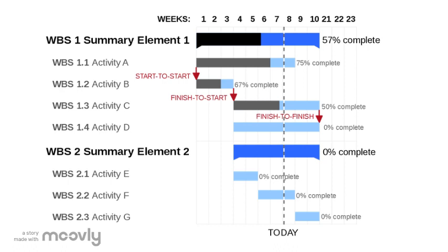A summary task consists of a subtask and their combined information. To create a summary task, indent a task that is below another. You can also make a summary task if it needs to be a milestone and if it's important by specifying in the description or clicking milestone. To create a subtask, a user must indent a task, which becomes a subtask of the task above it.